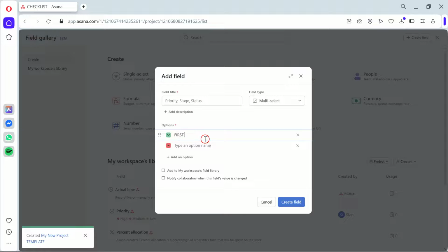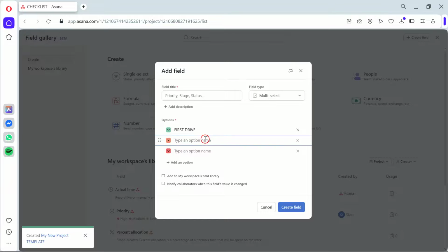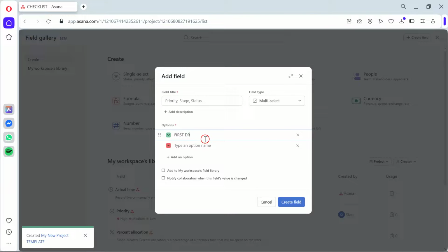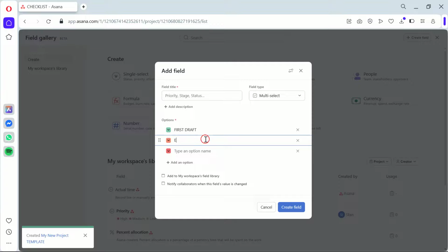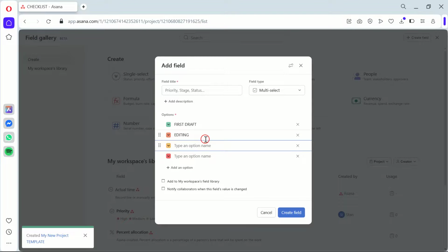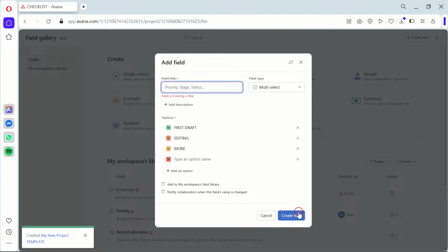We're almost done, just a few more things to cover. If you have a set of tasks or subtasks that will be reused in future projects, save them as a template. Click on the project header, then select Convert to Template. This saves us time in the future and ensures consistency across similar projects.